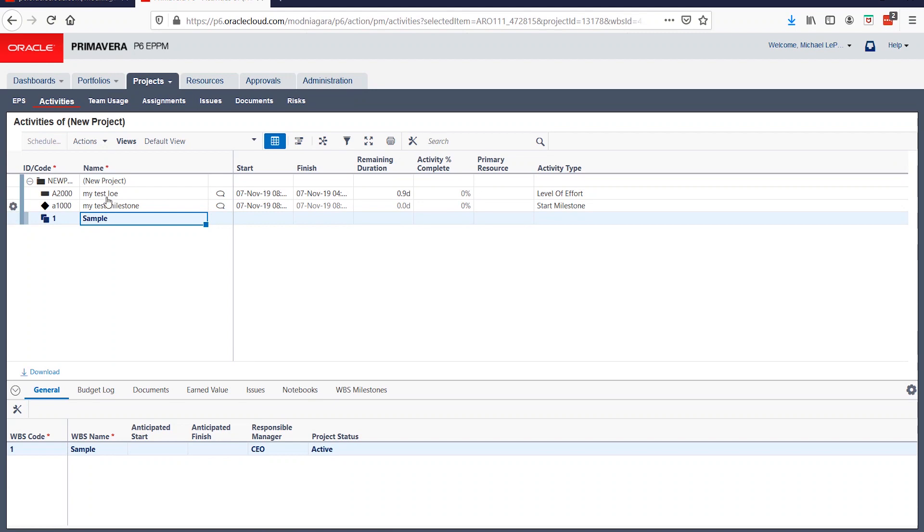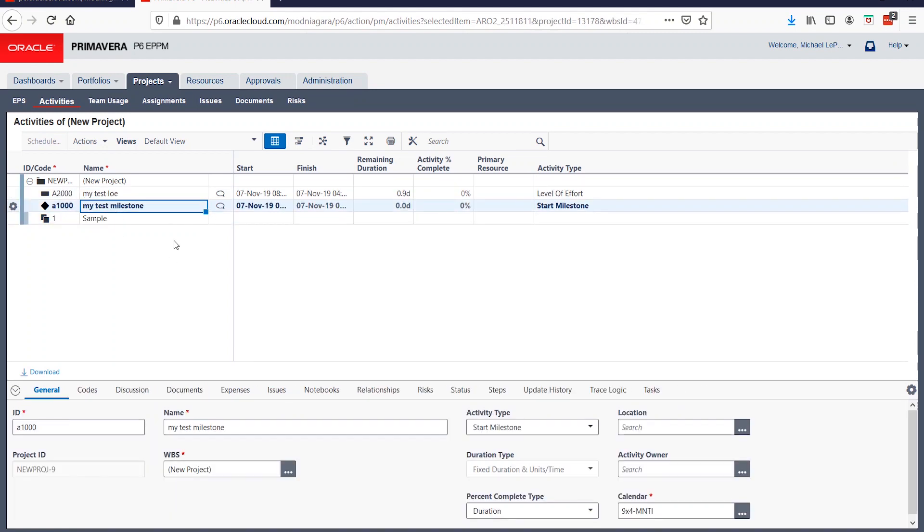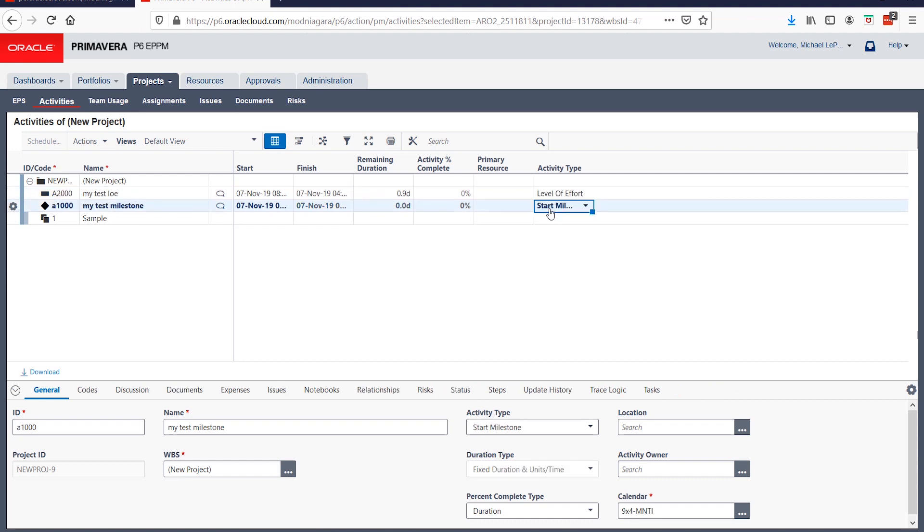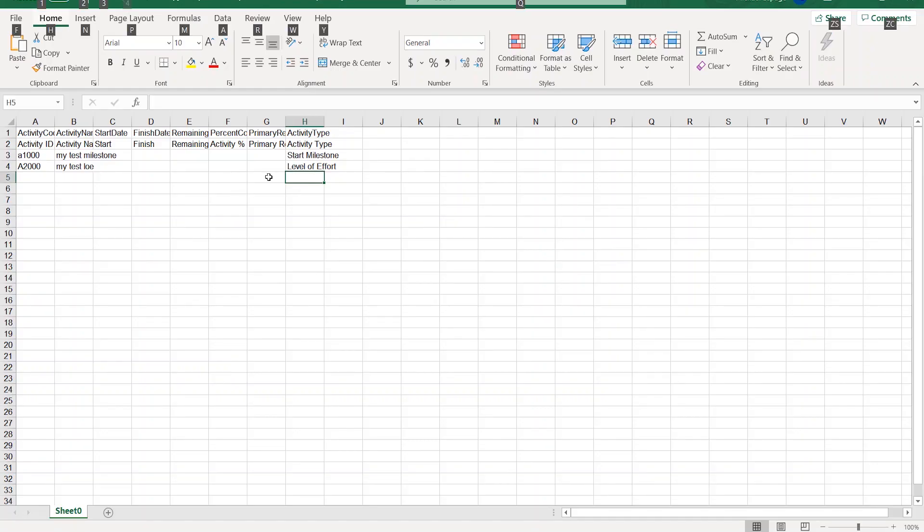So here is a sample project I just tested with. I was able to import a level of effort activity. I was able to import a start milestone activity. And it's just as simple as setting the activity type in the import Excel file, and it works.